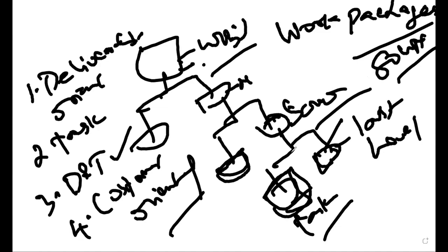They have to do the tasks: mechanical task, electrical task, plumbing task, submission task, metal submittal, milestone. They need to bring the task list. Once they define the tasks, they are able to estimate the duration, the resources, and the cost, right or wrong, guys? Yes, Bala. So now what happened here?